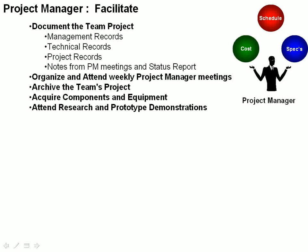Finally, let's talk about the project manager. A project manager helps facilitate all of this, makes the project flow, communicates deadlines, and makes sure the engineers on the design team as well as the customer and management understand where the project is. One can think of the project manager as balancing costs, schedules, and specifications. In this class at Oklahoma State University, the project manager is responsible for documenting the team projects by creating management records, technical records, project records, and meeting notes. They organize regular meetings, archive the project so information can be found later, acquire resources, facilitate the engineers' work, and attend demonstrations to understand where the project stands.